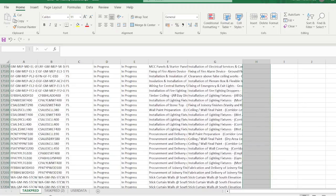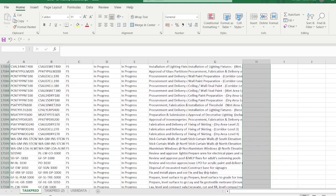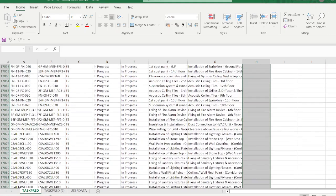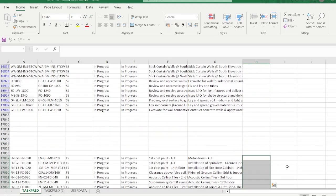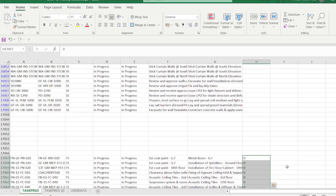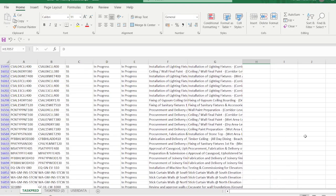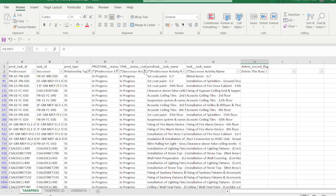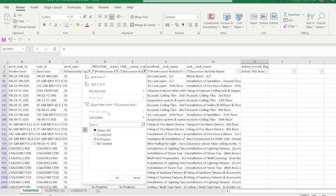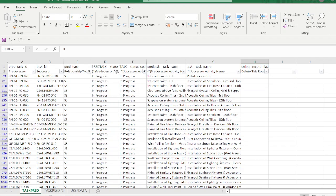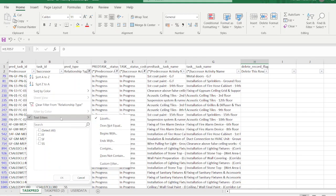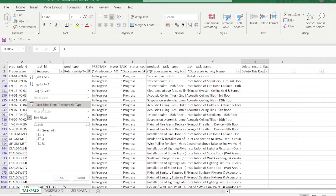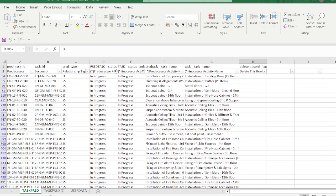Now we need to remove the old relationships. Go to the bottom with Ctrl+Down Arrow. These are the Finish-to-Start relationships that need to be deleted. Press Shift+Ctrl+Down Arrow to go to the end of the data, then press 'D' and Ctrl+Enter to mark them for deletion. Then go back and remove all the filters for In Progress.